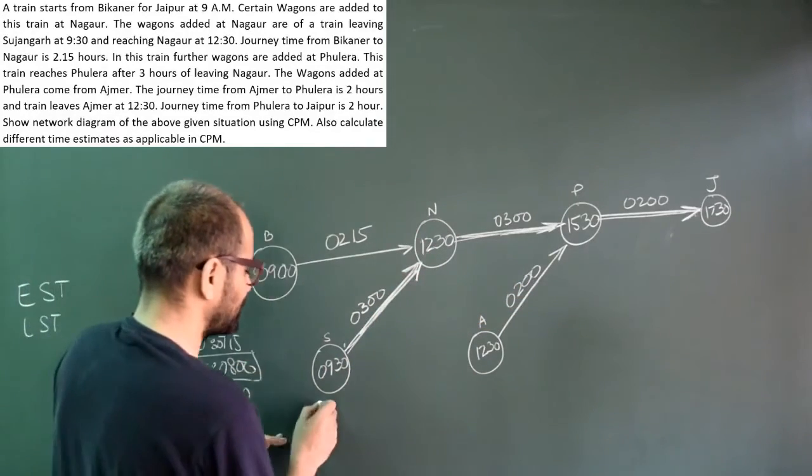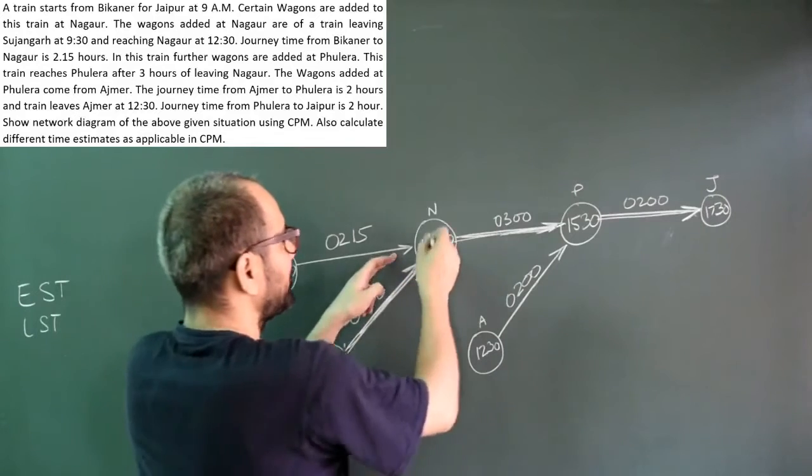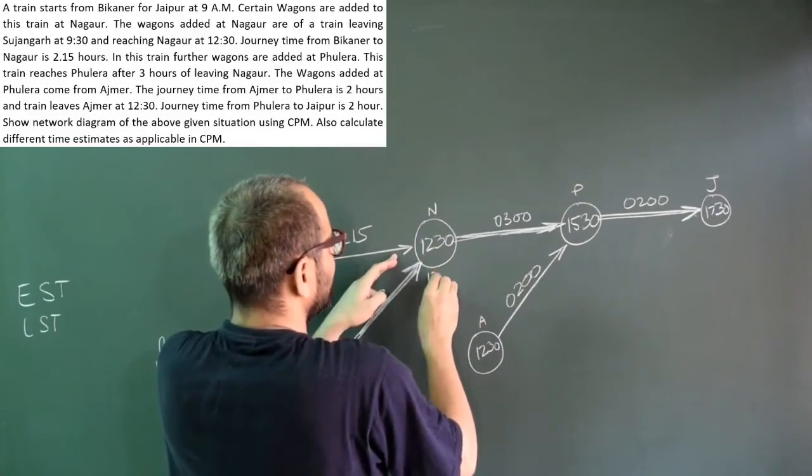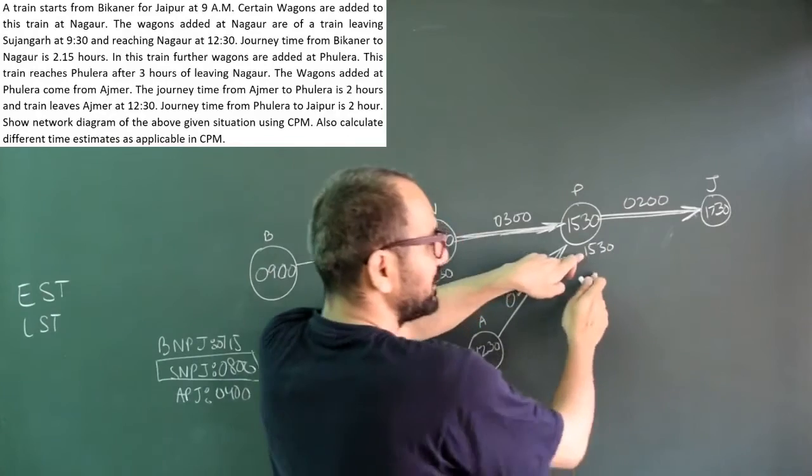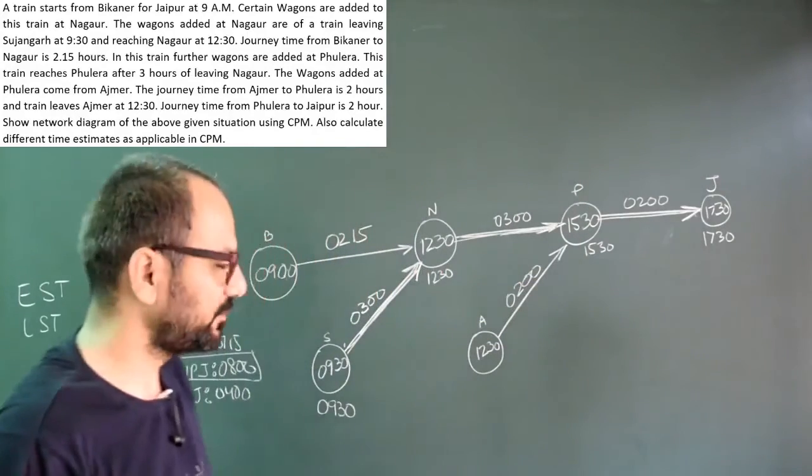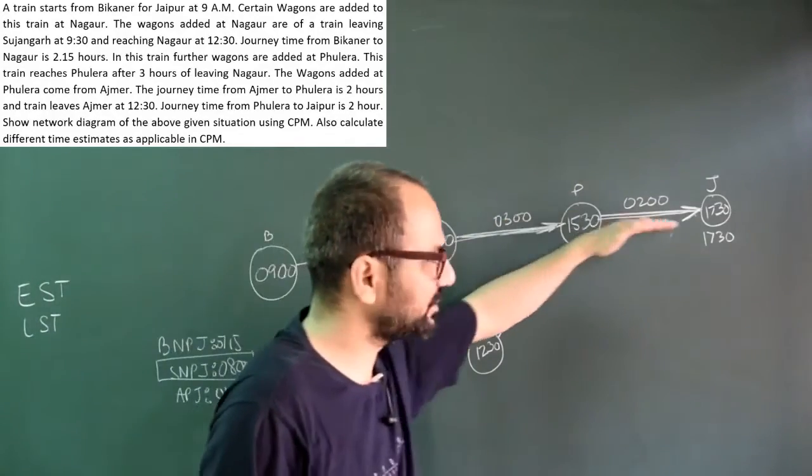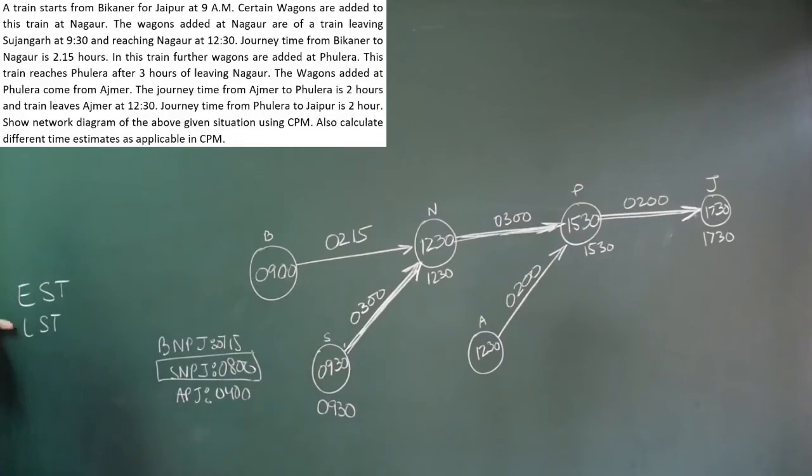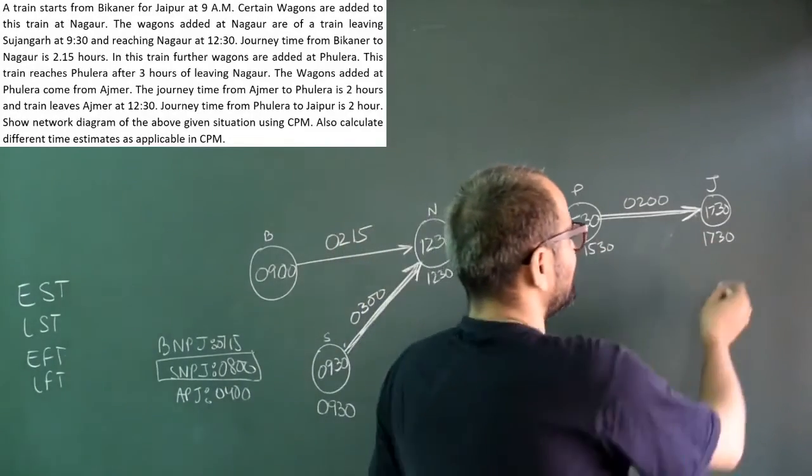Now we make a forward pass and a backward pass. Forward pass for earliest time. Suppose it starts at 9:30, takes 3 hours, it will be here by 12:30. 3 more hours, it will be here by 15:30. 2 more hours, it will be here by 17:30. This being a critical path, it has no slacks and floats. Its earliest times, earliest start times, and latest start times all become the same. So 9:30, 12:30, 15:30, 17:30.